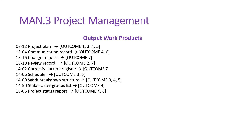The output work products are: project plan or the project specification document, communication records such as email or configuration management tool auto-generated records, change request, review record, corrective action register, project schedule, work breakdown structure or WBS, stakeholder group list, resource log or resource list with the competency matrix, and project status reports. Project status reports are given to top management and the client as agreed in the beginning of the project.